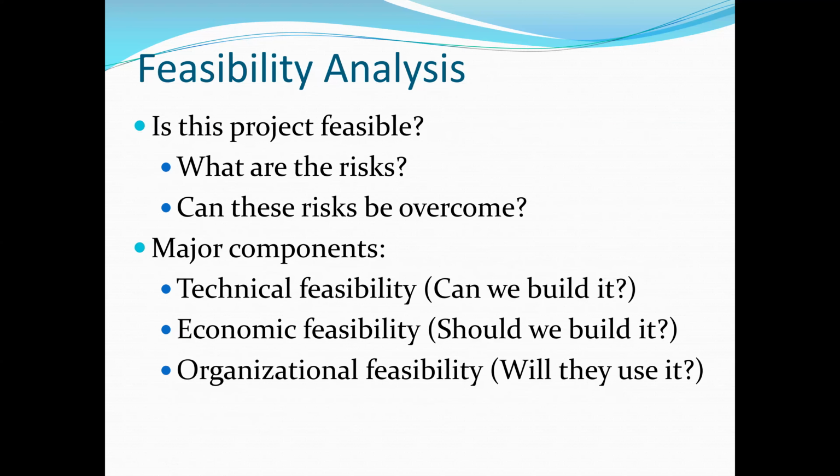So next we talk about the feasibility analysis, which is one of the important steps before the project may even commence. We have to consider the cost and benefit, which will be the economic feasibility. We also need to consider the technical feasibility. Do we have the technology to develop the system? Or is the technology a new technology? If it's a new technology, the chance of the project failing is high, and the chance of success will be very low. The chance of success of the project is low if the technology is very new.